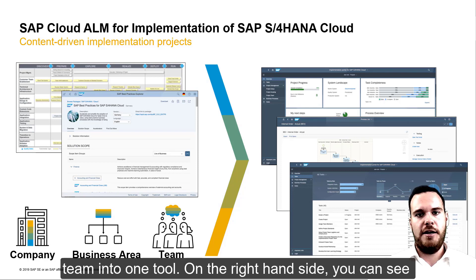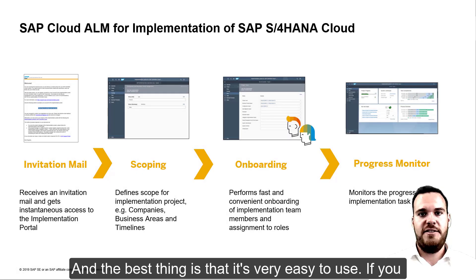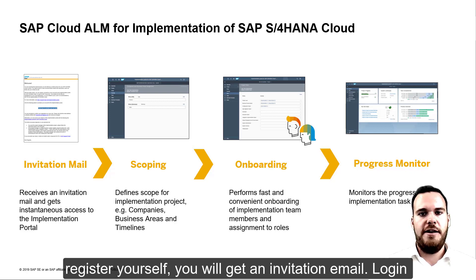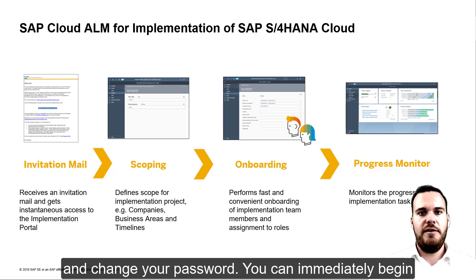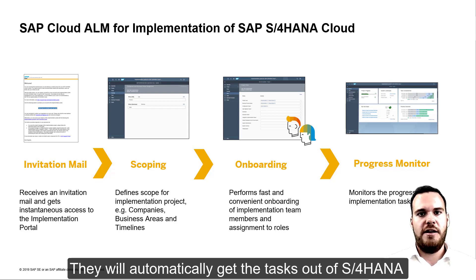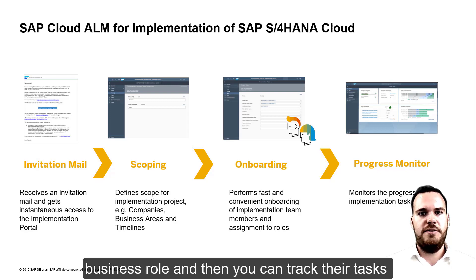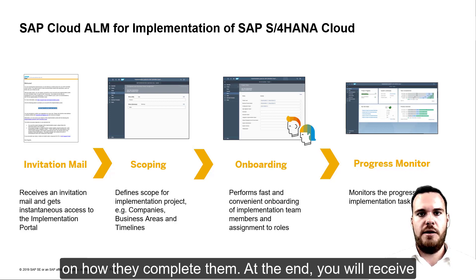On the right-hand side, you can see how it looks — it transforms into charts, milestone overviews, and task views. And the best thing is, it's very easy to use. If you register yourself, you'll get an invitation email, login, and change your password. You can immediately begin scoping your solution and assigning project team members. They will automatically get the tasks from the S4HANA Cloud Activate methodology that are assigned to their business role, and then you can track their tasks as they complete them.